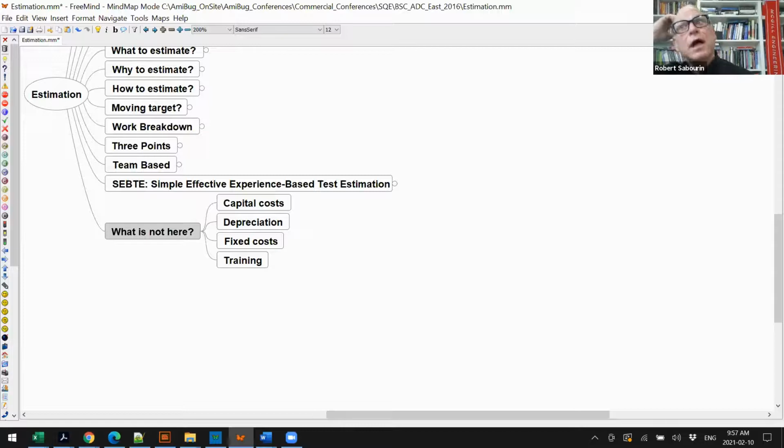And usually the data ones have low complexity but high size, unless you're in medical information, for example, where you have to use analysis methods to get the data. But if it's just constructing data and assembling it in the right form, what I like to do is identify that as a task or a series of tasks, and for each task assign a size and complexity. Usually the data ones have high size, low complexity, but I still identify them explicitly. And that's part of the discussion in the planning meeting.